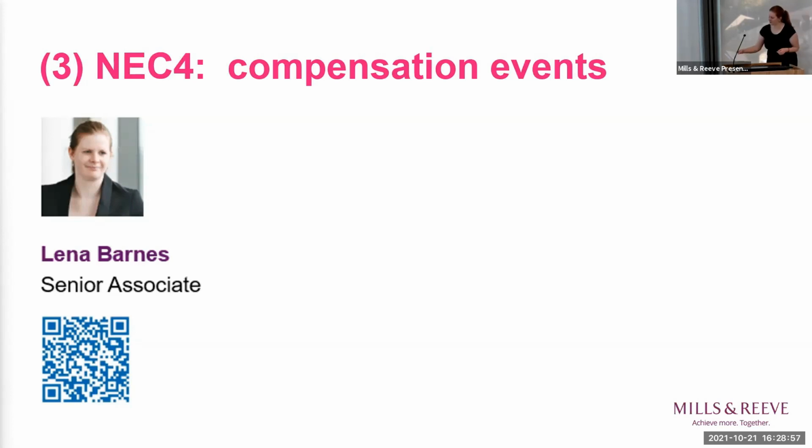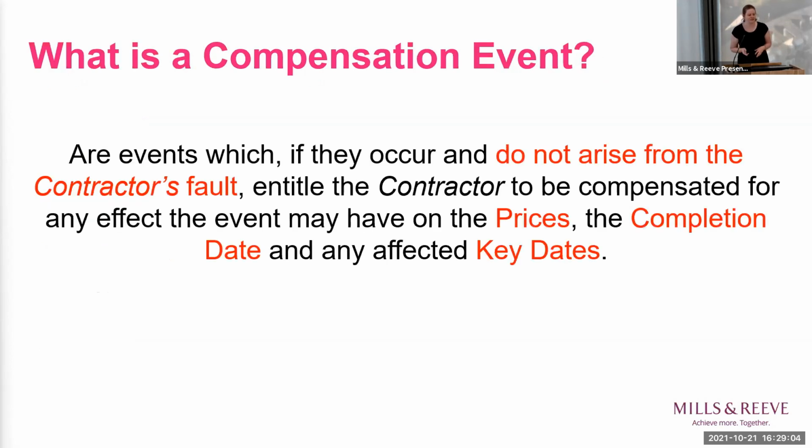Thank you, Alex. So, as Stuart explained earlier, I have the joys of explaining compensation events to you. So, taken very simply, what is a compensation event? It is an event which, if it occurs, does not arise from the contractor's fault. It entitles the contractor to compensation. Unlike other standard forms, the NEC considers compensation in both time and money together.